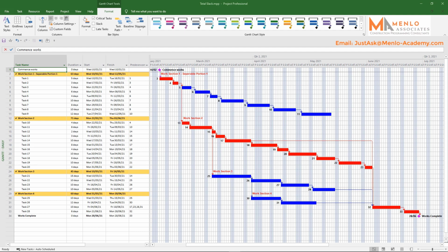Because the planned finish date will also be the last day in the contract where the client will pay you for things like running costs, this can lead to mounting pressure towards the end of a project, and big losses if you can't prove why any delays to completion essentially weren't your fault. Knowing how to access and use the total slack column then can help you to monitor how the slack on project tasks is developing, help to inform your project optimization decisions and how fast you can make them.